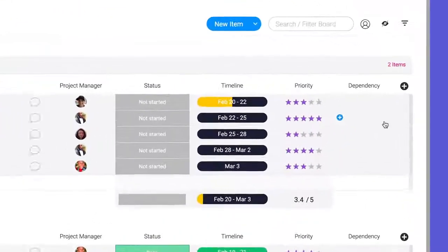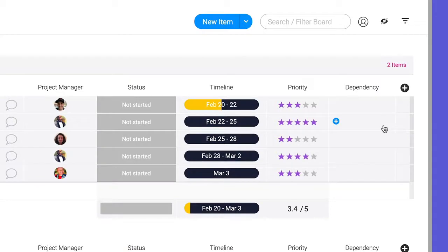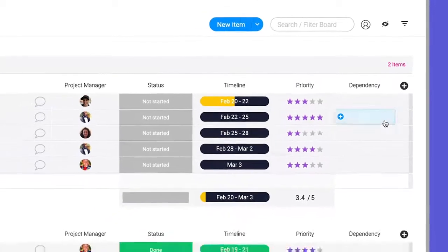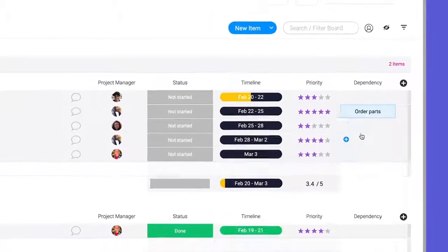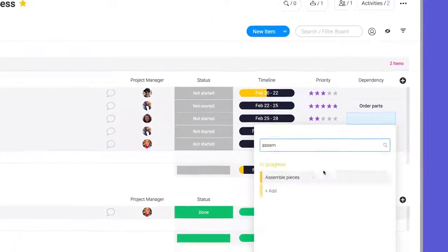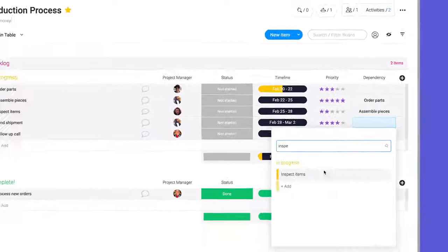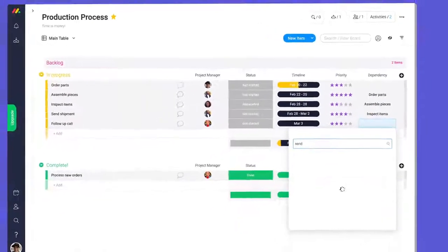Here, we'll select which item each task depends on. Since these tasks are in order, I'll select the item above for each one.